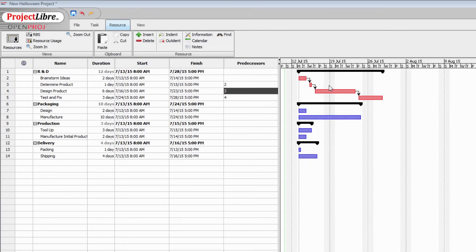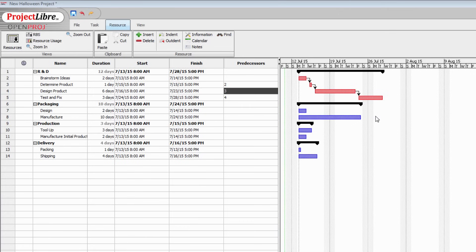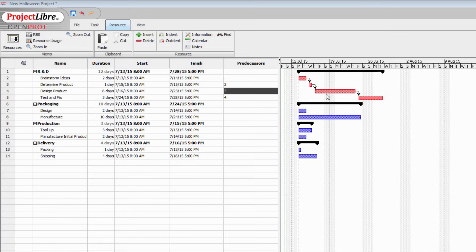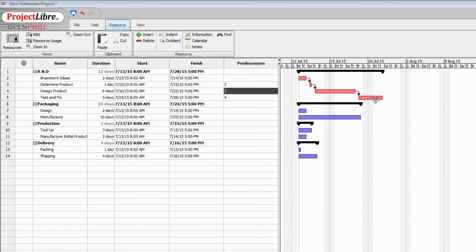The fact that these items are now in red is telling us that they're on what is called the critical path. This is a sequence of tasks that add up to the longest overall duration for the project. In other words, once these are complete, the project will be complete. But any change in the time that any of these tasks takes is going to have an effect on when our product is ready. Now we've still got a lot of dependencies still to build. So let's have a look at the rest.